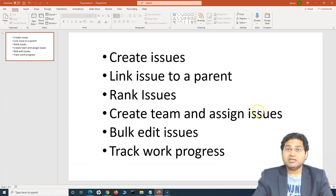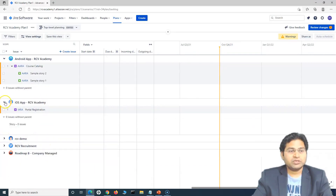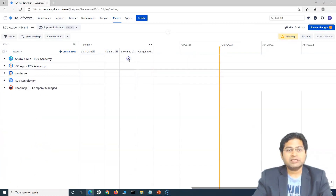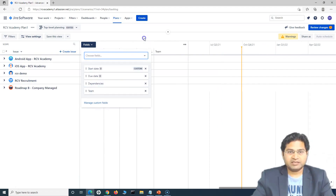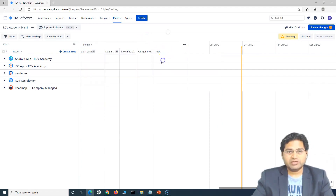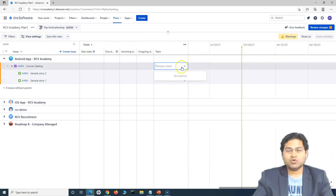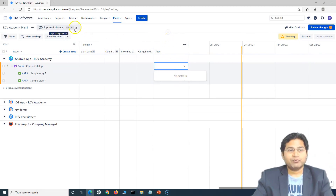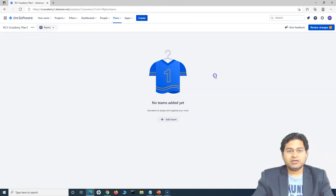Now let's move to creating teams and assigning issues — that's very important. Once you have all the issues in your Jira roadmap, you want to see which team will be working on which items. To get the team list, go to fields and search for team, then add the team field. At the moment there are no teams added. In order to add teams, go to the top-level planning dropdown and click on Teams — you'll see no teams have been added yet.